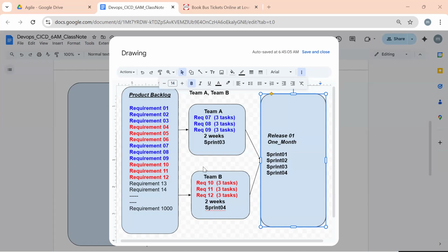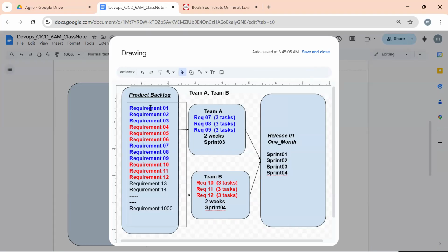I hope you people understand very clearly. Each and every requirement is logged into the product backlog based on the priority by the product owner. The teams iterate based on the priority. They convert them into tasks and complete them, making working software within 2 or 3 weeks. In this sprint duration, whatever the duration, it's going to complete design, implementation, testing and delivery into the release.